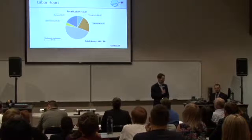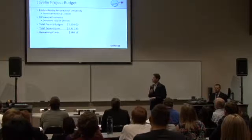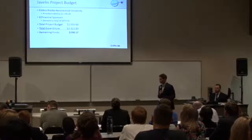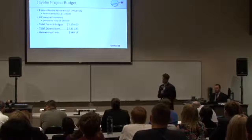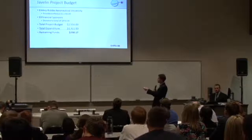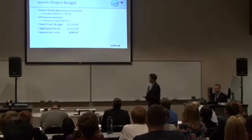At the beginning of last semester, we were awarded $1,700 from Embry-Riddle Aeronautical University. From there, we also sought out 8 additional financial sponsors that donated a total of $850, giving us a total project budget of $2,550 for us to use for both the system fabrication as well as for the testing of our system. This also becomes our first system level requirement: remaining within that $2,550 budget. To date, we have spent only $22,311, giving us a remainder of $240. This means that the validation of that first requirement was a success.